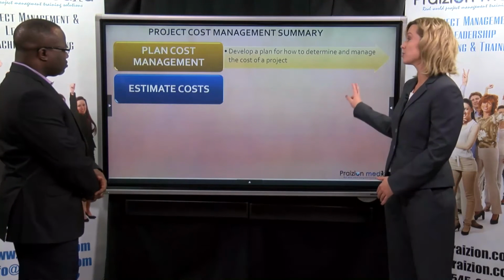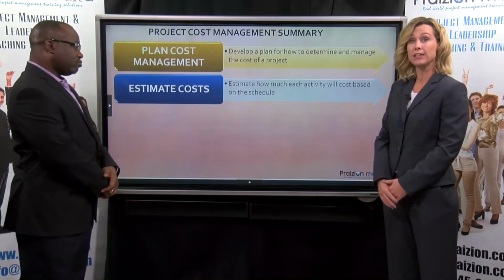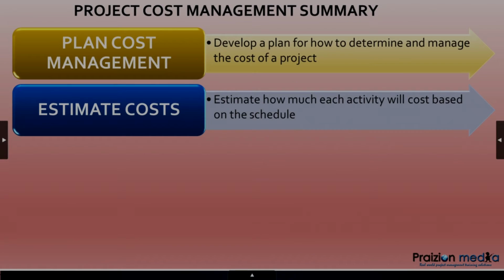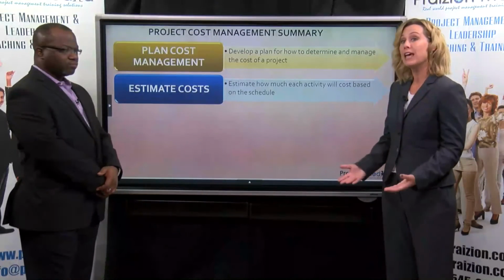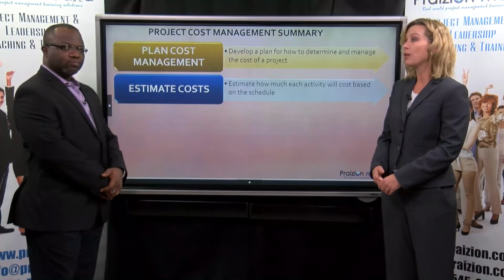Estimating costs is where we're taking a look at all those activities that we defined and what their durations are and the resources that will be associated with those activities and any contracts that we have signed that we know about. We even look at some of the other things within other areas, like do we have testing costs for quality? Are we going to incent our resources? Are we going to pay for training?